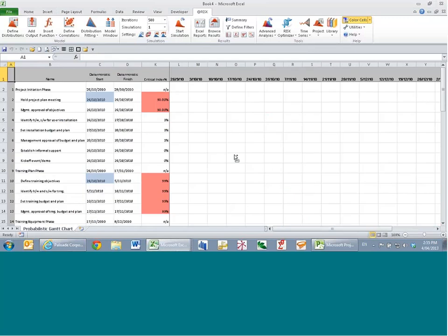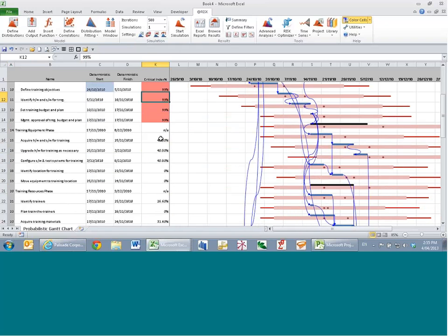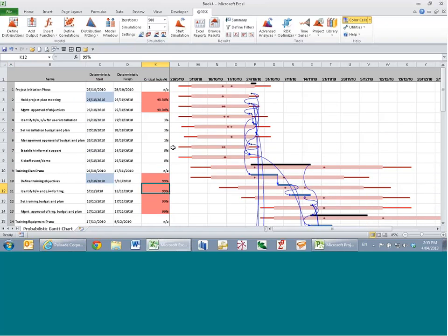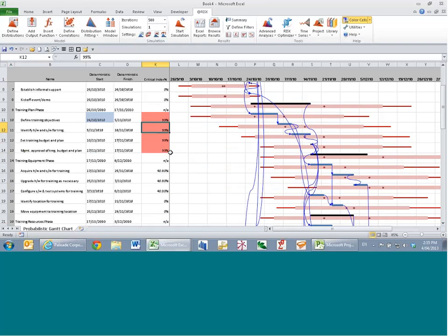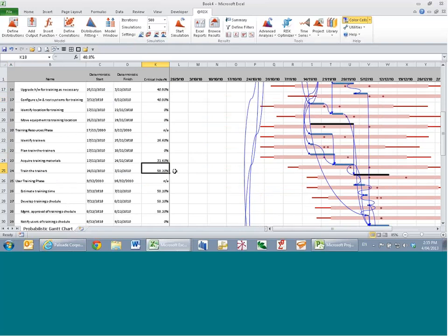Now what this shows is the different probabilities that any of these items were critical. Initially we see 98.8 and 1%, 0%, 99% and so on. So they're essentially either always critical or always not in practical terms. But here I have some examples where it's 40% or 30%, 60%. It would be up to me, my organisation, to determine whether or not these are worth looking at.